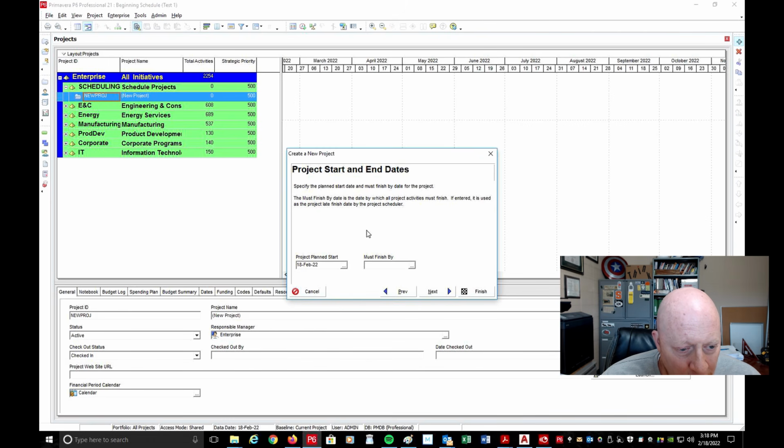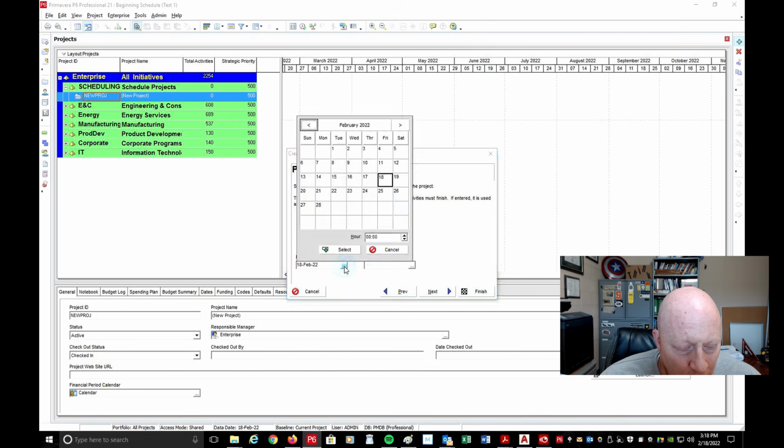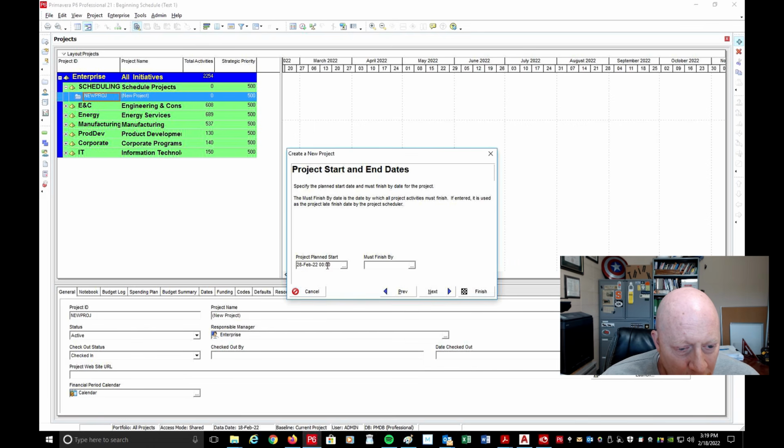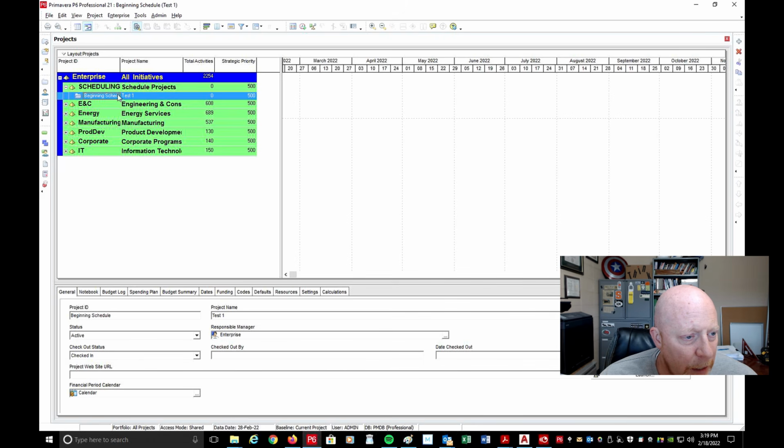So now it says project start and end dates. Depending on when you're watching this video, obviously this may be dated, but let's just say I want to start this on Monday, February 28th. Okay, and I'm going to hit select. Must finish by, I'm going to leave that open. Some projects have a drop dead finish date. Some projects just do the start date. It just depends on what you're actually using. And then I'm going to hit next. All this is fine. I'm actually just going to hit finish at this point. Okay, so now I've got this thing over here. It says beginning schedule and test 1.